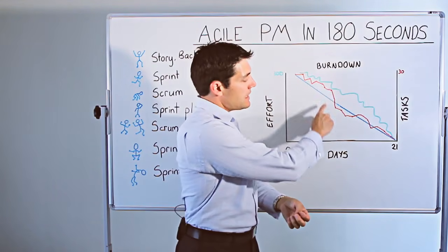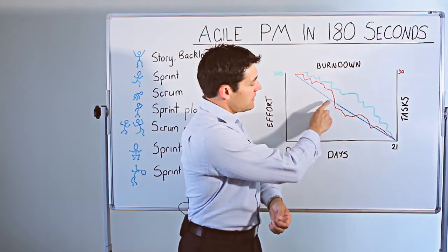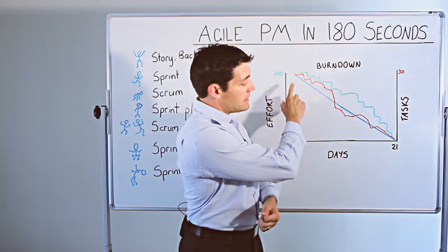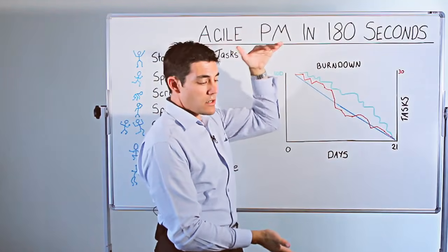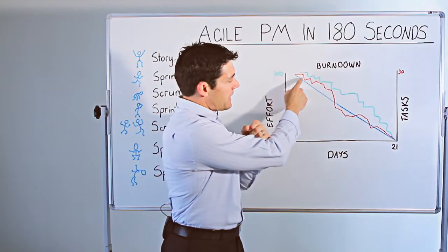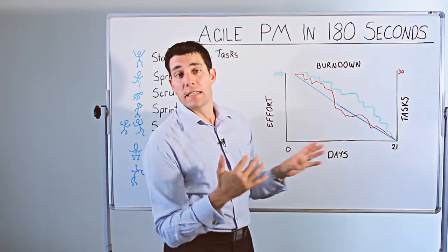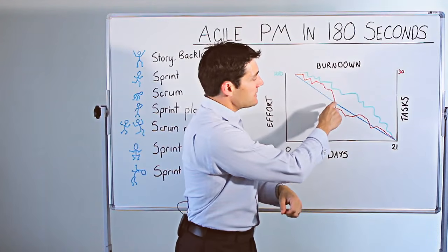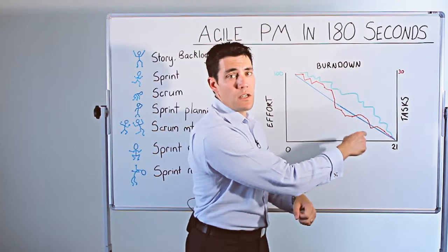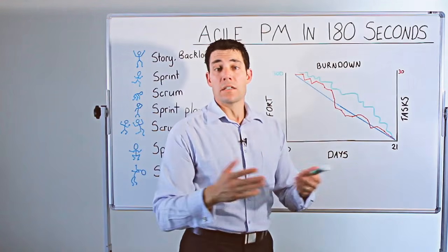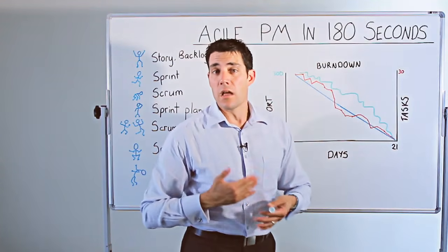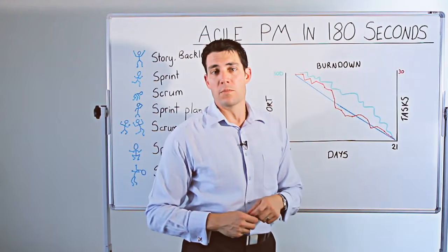What you should be seeing along the way in your sprint is that the hours left to go whittle down. You start at 300 hours in your hopper, and you subtract the number of hours per day the team is working, and you're also counting down the number of tasks left to do to achieve the backlog. Where they get to is an indication of how successful that Scrum worked together in that particular sprint.